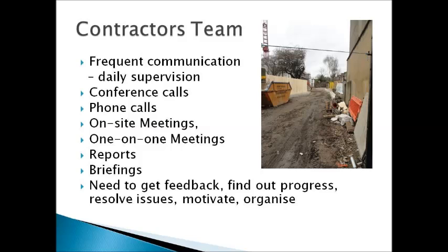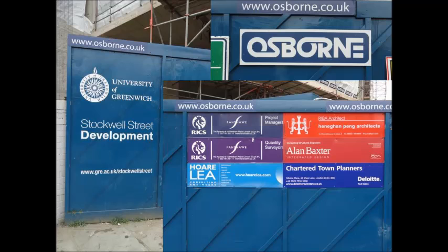Conference calls through systems like Skype can be advertised so that they are open, allowing all interested parties to hear what is being said and give their feedback. This can prevent more than one activity being scheduled in the same area of the building at the same time. Briefings will help remind the contractor's team of tasks that need to be carried out, such as test and commissioning certificates for electrical, mechanical and specialist installations, or providing a plant operation and maintenance logbook.